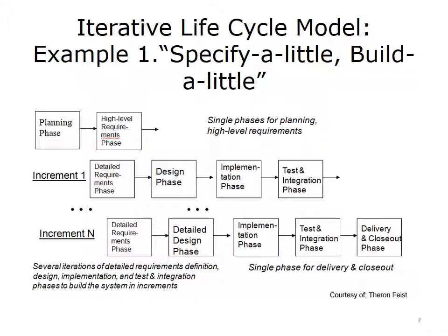Notice that there's an integration phase at the end of each increment, so you always have an integrated system, and it is growing over time with each increment that gets implemented and tested. When the final increment is complete, so is your entire system, and it would be tested and ready for delivery and installation.